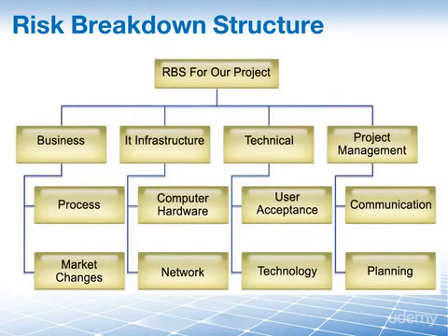We may find a risk breakdown structure in there, but not the risk breakdown structure for each individual risk, but instead here, as you see it, a risk breakdown structure in regards to categories. So like all the other breakdown structures, the risk breakdown structure is a graphical hierarchical structure, and in this particular case here, as we are developing the risk management plan, we want to create it for our risk categories.